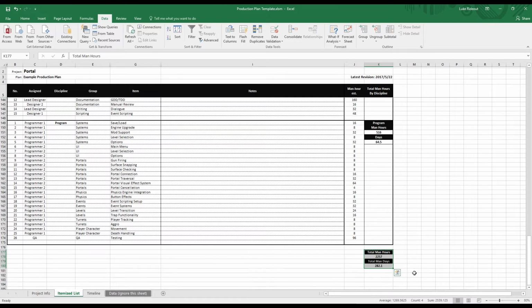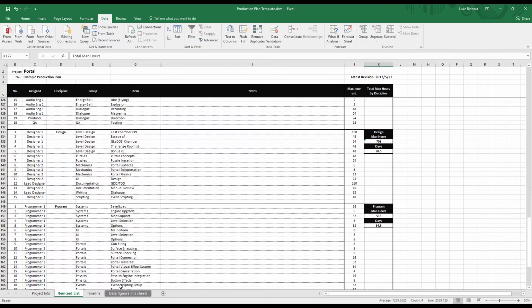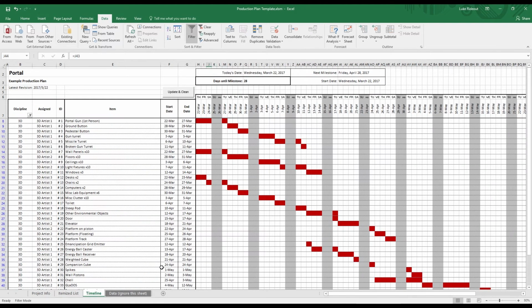We would need the portal gun to be done by the 3D artist before an animator can touch it, and likewise, effects frequently need to wait for animation to finish. These tasks can certainly cascade, with an artist finishing one item then moving on to the next while the animator takes on their tasks, but ultimately a project can't have all members working on everything at once, as there are going to be elements that rely on other tasks to finish first.